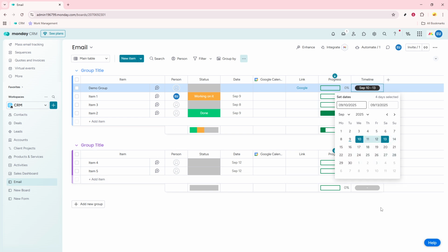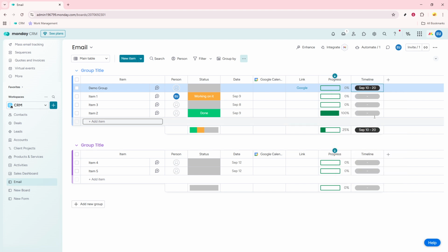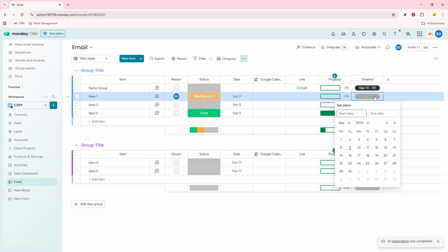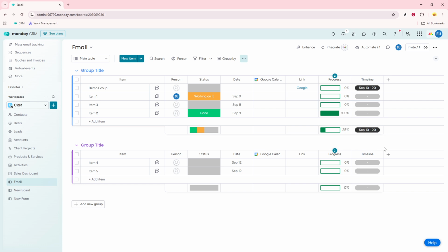But if you're fortunate enough to have a version of Monday.com that supports a more direct approach, here's what you'll do. When you're in the timeline column settings, or if you're interacting with the date picker pop-up, you should see an option to Set as Milestone. This could be a checkbox or an action you can select. Simply go ahead and check it, or select the action, and voila! Your item is now marked as a milestone.